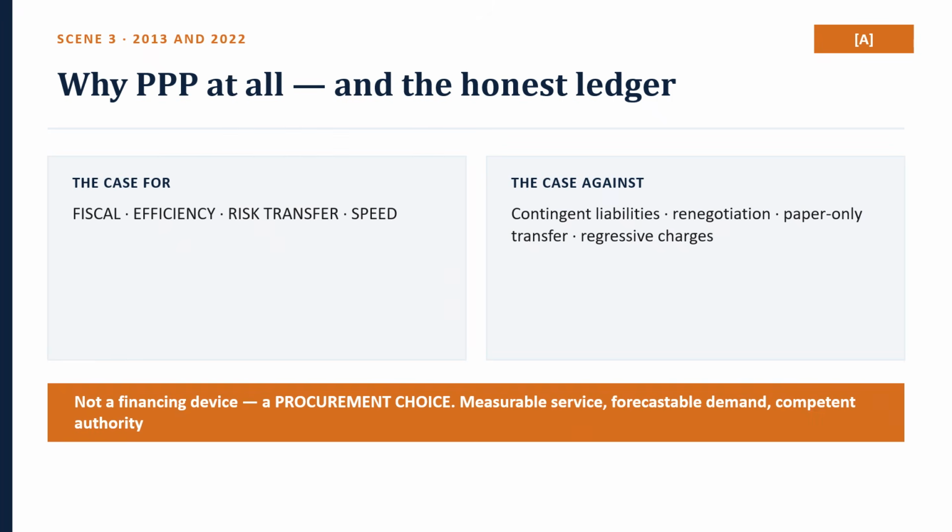And now the single most current fact on this question, which almost nobody will have. The BOT model concession agreement is being revamped for the first time since 2007-2008. The independent monitoring contract is completed, the HAM model concession agreement is being finalized, and EPC is being revised after HAM. So why does this matter more than it looks?